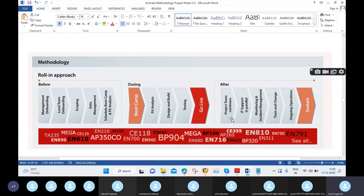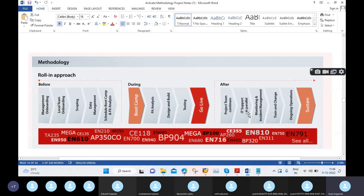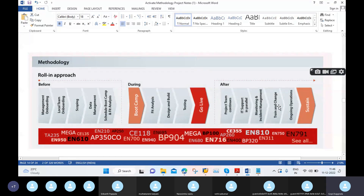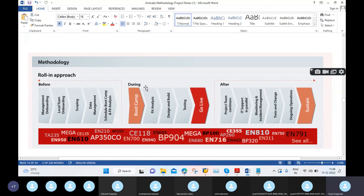After go-live, the project team continues in support mode. The IT support runs in parallel, and the team handles monitoring, incident management — meaning support tickets — and change management for any new applications or new functionalities that come into picture, requiring training. Finally, ongoing operations are sustained in this after phase.